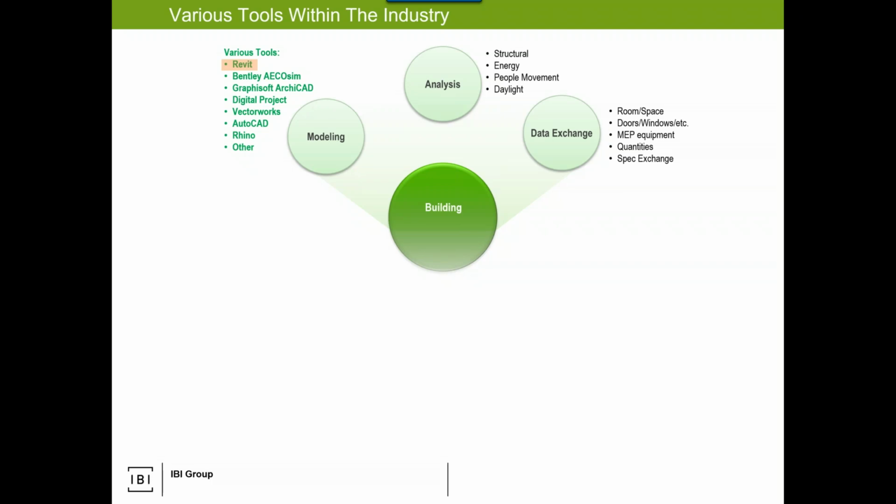Then when I get projects, and we do have some, for example, the Toronto Transit Commission requires EcoSim. So with those EcoSim projects, then it's a thing of beauty, because now it's new license procurement for specific areas of our firm, knowing that the ability to work on these projects is much narrower because all the training has happened with Revit software. With that said, if you know Revit well, it's not rocket science to open up EcoSim and explore it and understand it. So we're balancing that right now and looking at how we're going to deliver the EcoSim required projects, knowing that our user base is Revit.